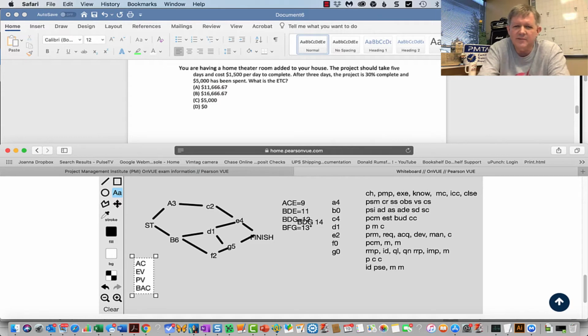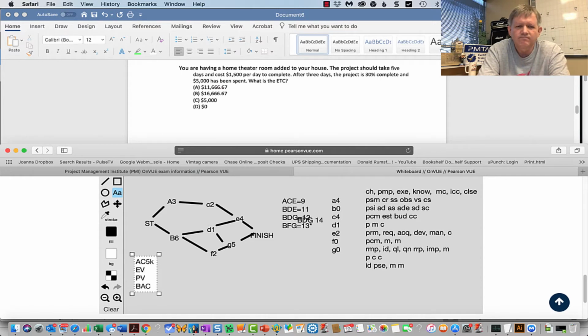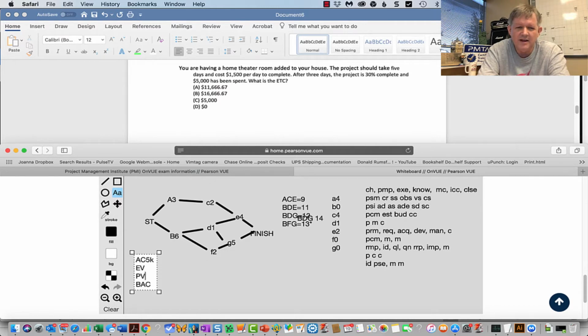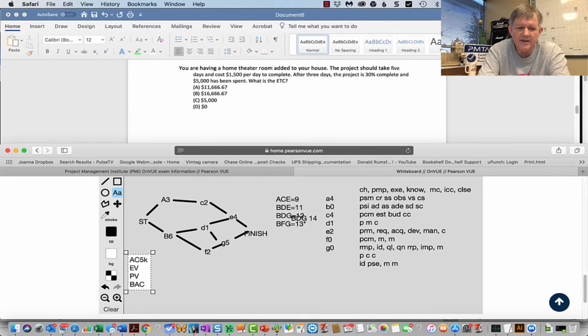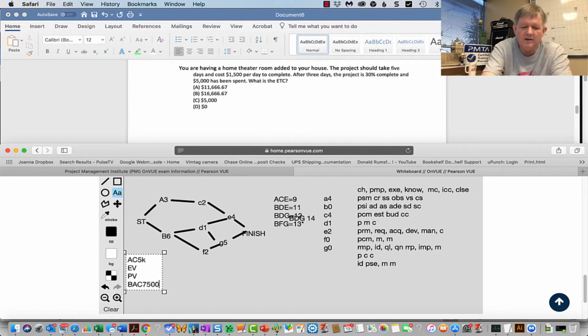So let's see. Spent 5,000, so I'm just going to say 5K. Earned value, let's see, not there yet. Budget at completion. Okay, 5 days at $1,500 a day. That is going to be $7,500. Okay, and then okay, earned value.